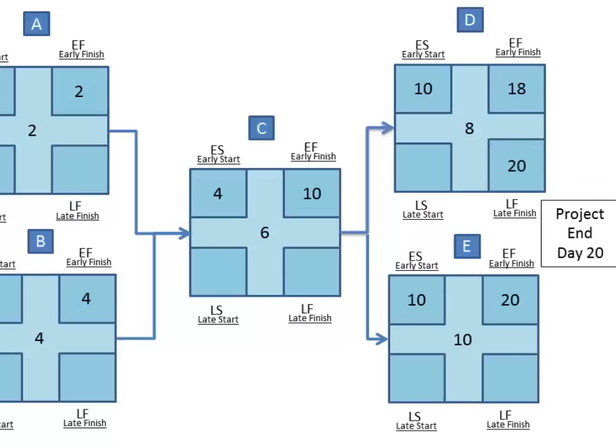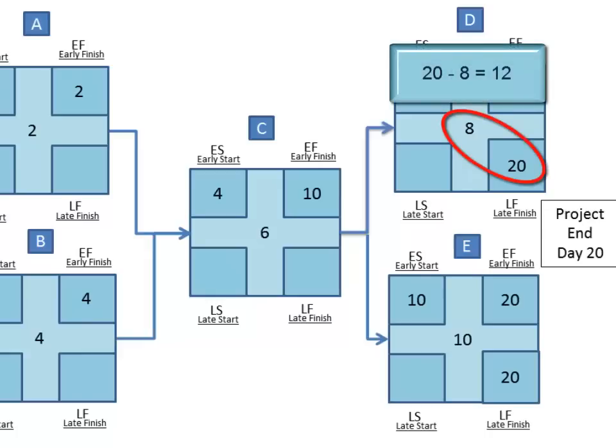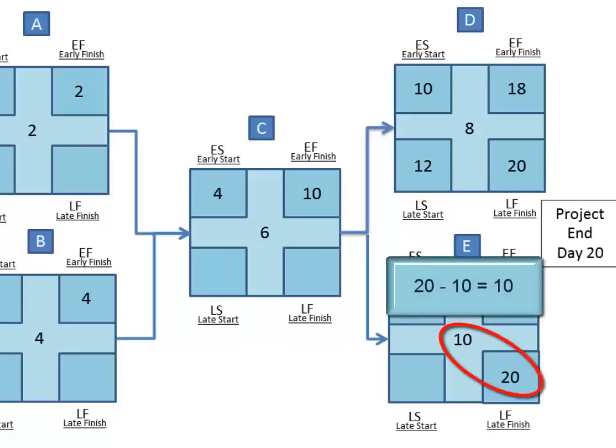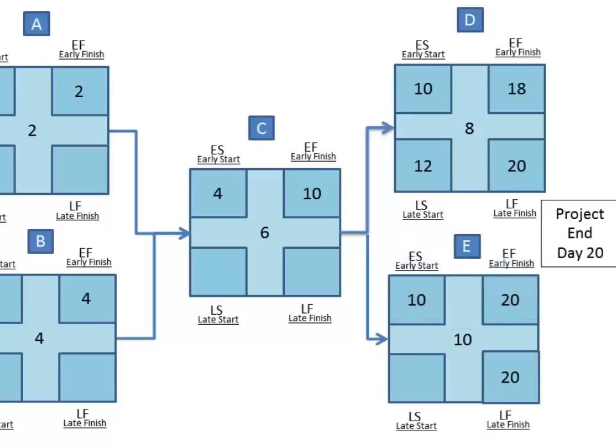And we'll also put twenty here for task E. Now we will calculate the latest day that task D can start. To do this, we subtract the duration of the task from the latest finish, or twenty minus eight, which is twelve. For task E, we follow the same method and subtract ten from twenty to get the early start of ten.